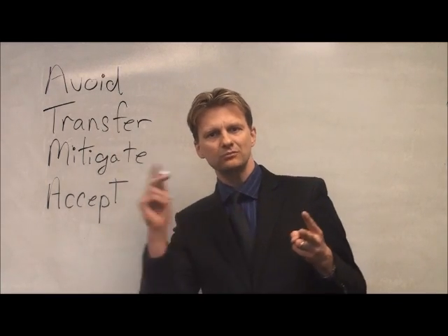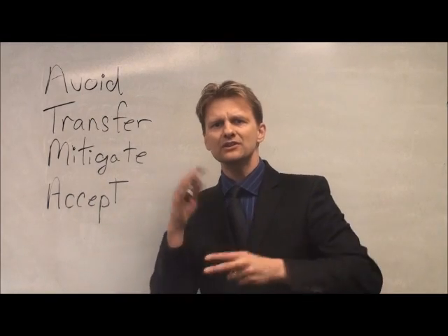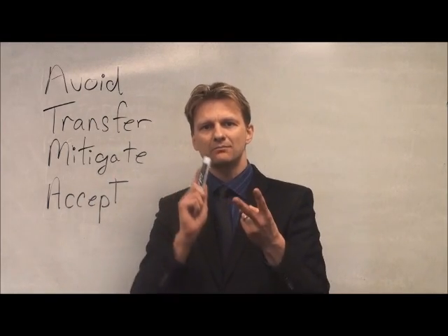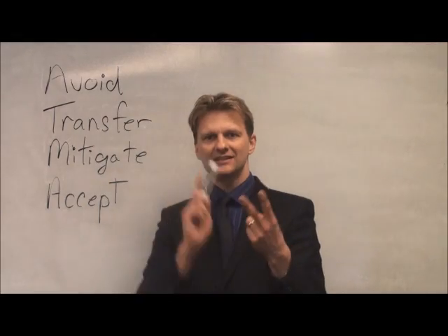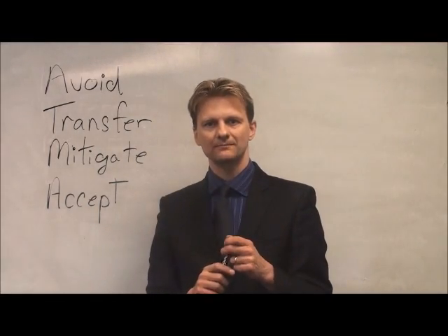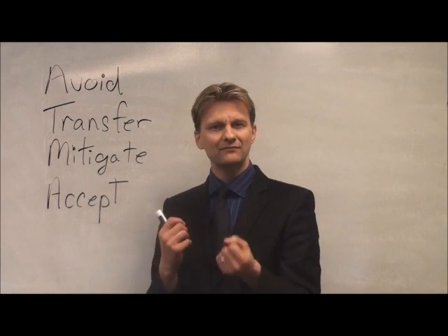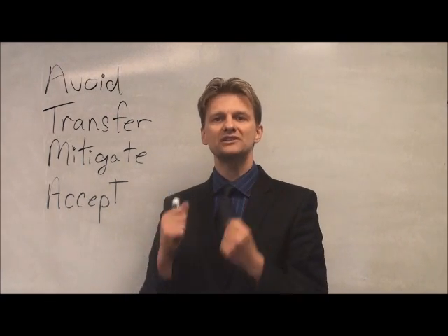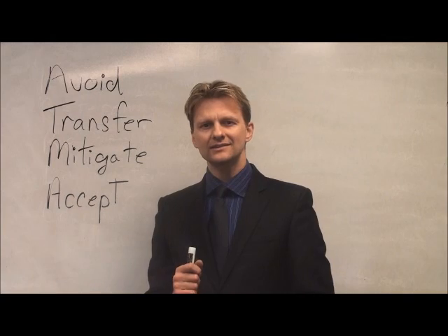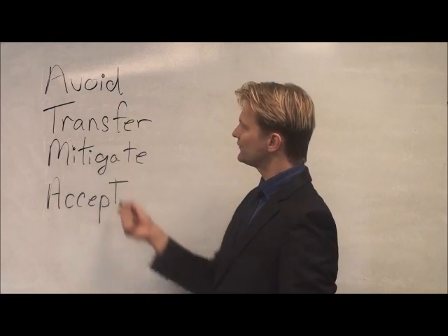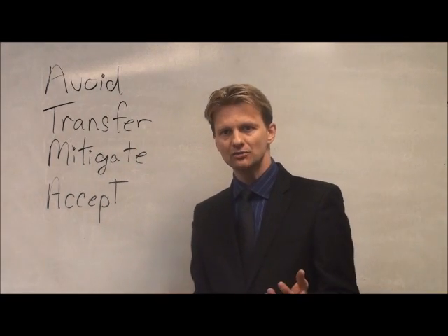And you might want to see another blog about analyzing. That's where you use the term PICTA. You analyze the probability, impact, cause, timing, frequency, and alternatives. Now this is that third part, now that you've done the analysis and you have some information about it, now you can respond. That's when you make the decision to respond. And there's 4 ways you can respond to it.